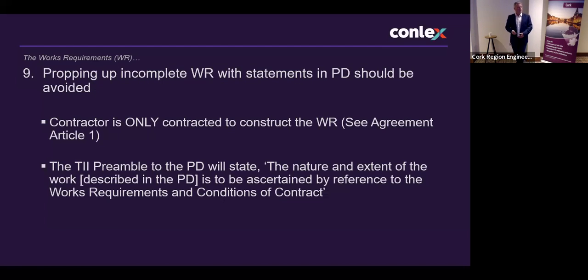Propping up incomplete works requirements with statements in the pricing document should be avoided. You see that an awful lot, where the person drafting the pricing document, because of their experience, is probably aware that the works requirements are possibly incomplete. They put items into the pricing document to, I suppose, close off that particular area.